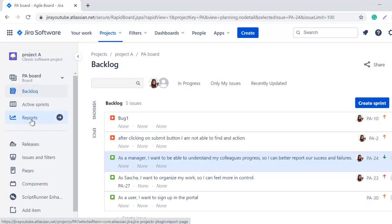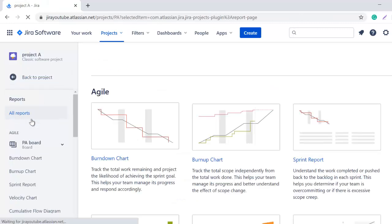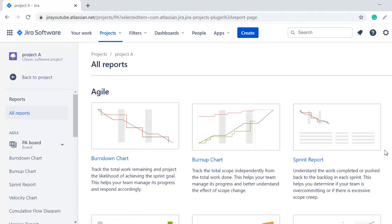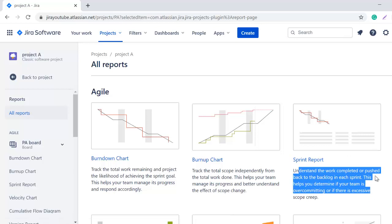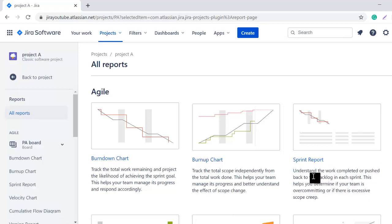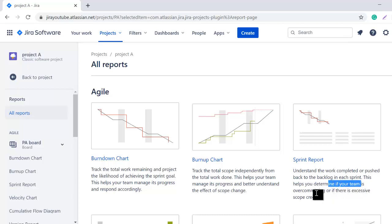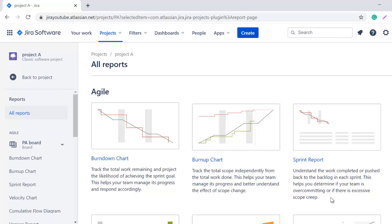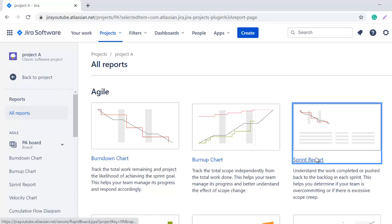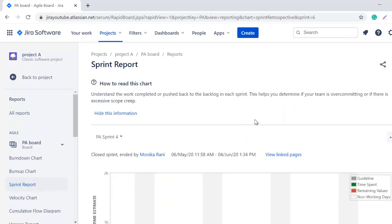I'll go to the Reports from the left sidebar. I'll click on the Reports section and it will bring me here where you can see we have multiple agile reports. In my previous video I explained the burndown chart, and in this video we are looking at the Sprint Report. It's clearly written here what is the use of the Sprint. Sprint Report is basically used to understand the work completed or pushed back to the backlog in each sprint. With the help of the Sprint Report you can also check how many issues are moved back to the backlog from the sprint. This helps you determine if your team is over-committing or if there is excessive scope creep. It's very useful to determine if your team is giving the estimation right or if they are doing over-commitment or if there is excessive scope creep. Now we will click on the Sprint Report.